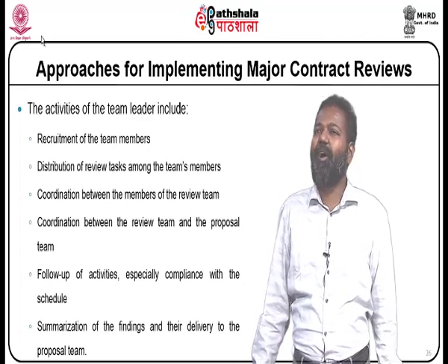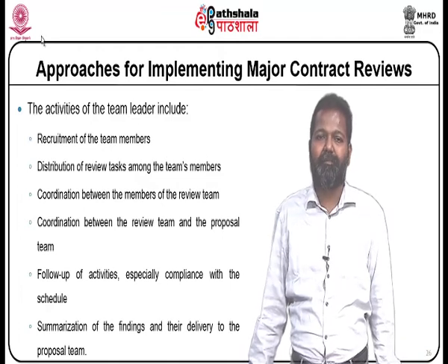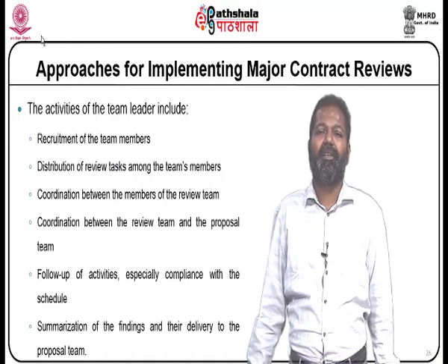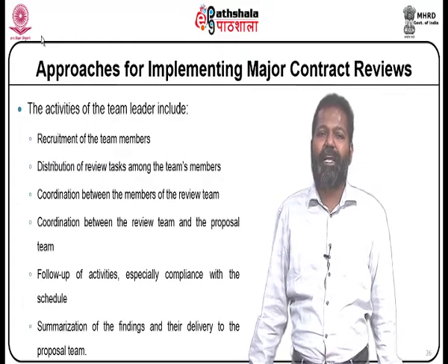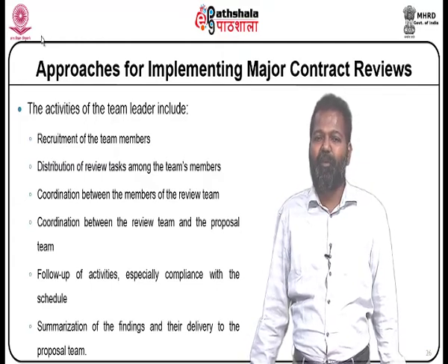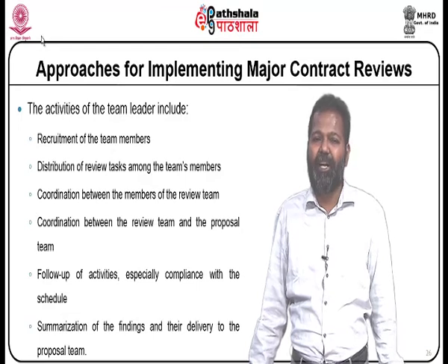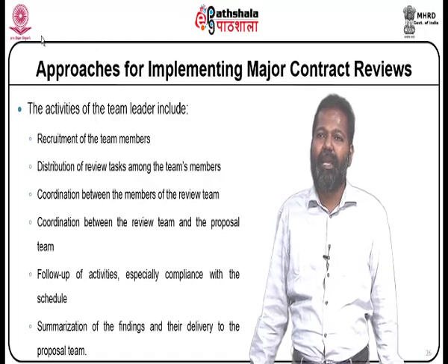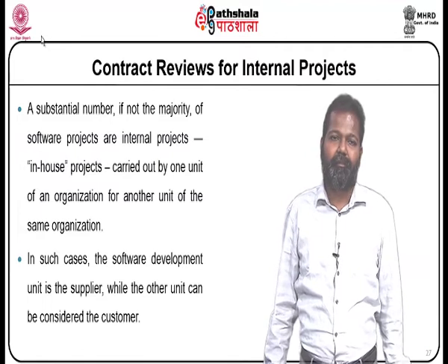The activities of the team leader include recruitment of team members, distribution of review tasks among the team members, coordination between the members of the review team, coordination between the review team and the proposal team, follow-up activities, especially compliance with the schedule, summarization of the findings and their delivery to the proposal team. Contract reviews for internal projects.